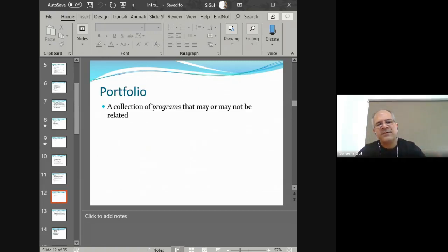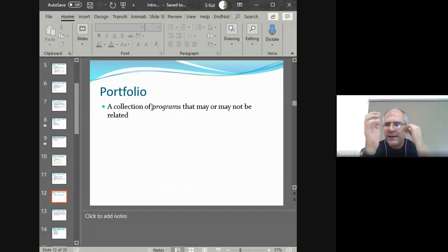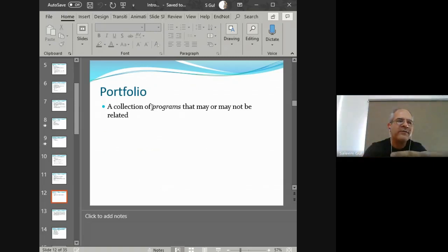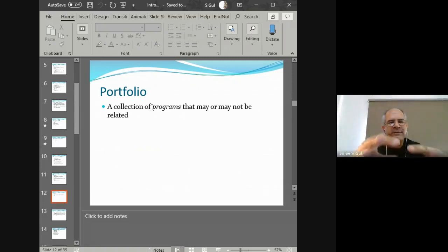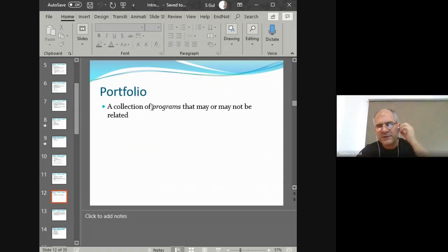Then there's a bigger umbrella above a program — when you have a much bigger goal that cannot be achieved by one program. For example, a goal about improving people's health might involve a program about polio, a program about diabetes, about cancer, about heart disease — each with its own subprojects and projects. The biggest umbrella is the portfolio, then you have programs, within programs you have projects, and within projects you have subprojects. This is a hierarchy that exists.